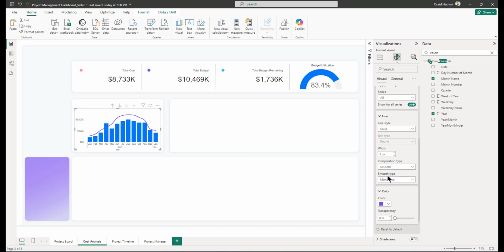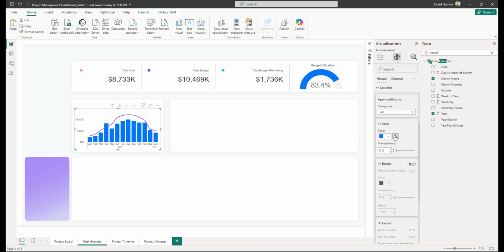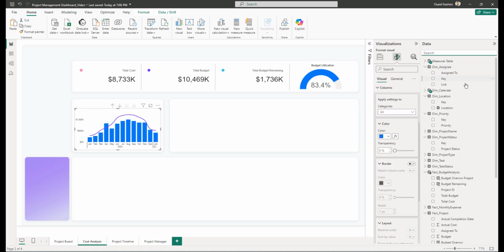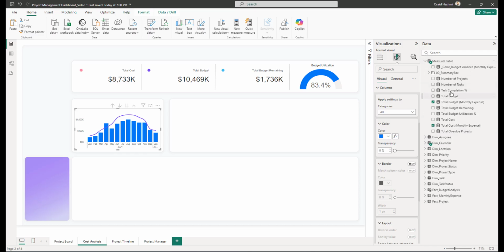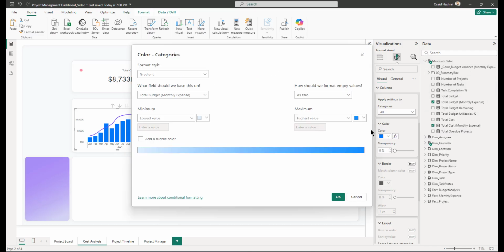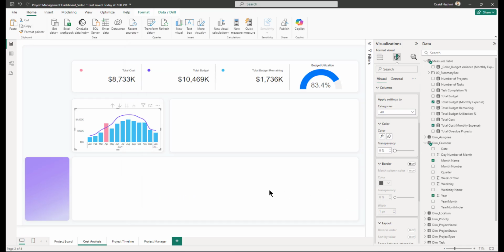Yeah, this looks better. For the columns, we are going to write the formula, which we already wrote actually, which is the colors formula. Let me just minimize all of this mess. Okay, so we are going to bring this color coding. So here we can see that in any month, if the cost was more than the budget, then we have a red column, otherwise it's a blue column.